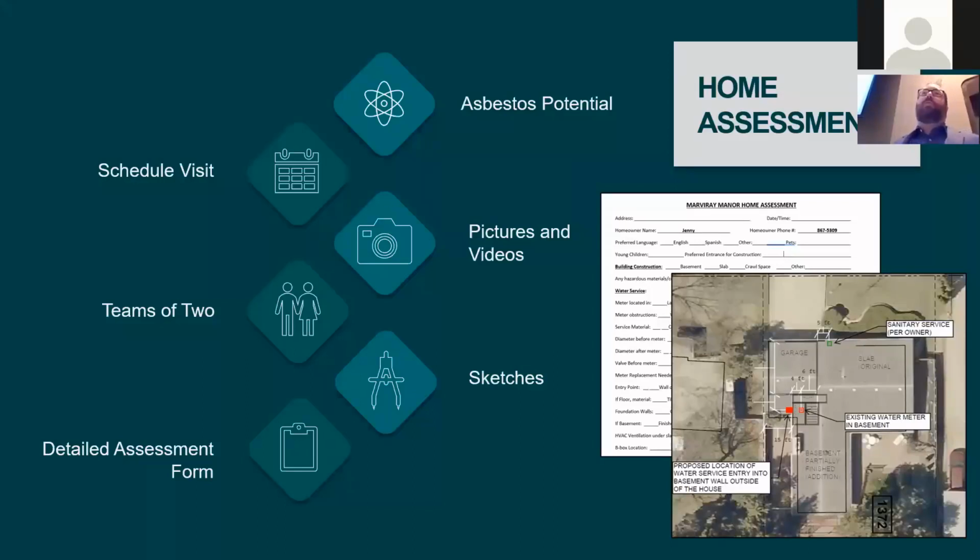You may need to be flexible with when you allow the home assessments to take place, to work around people's work schedules and other things like that. So that might mean evening home assessments or weekend work just to get all of them in. It's also a good idea to use a team of 2 when you do these home assessments, ideally 1 municipal employee and someone from the design team. It helps to have a municipal employee there so that they can kind of be the face for the municipality while the other person from the design team is gathering information.